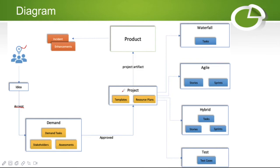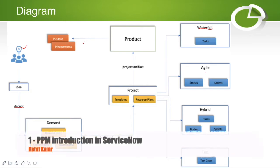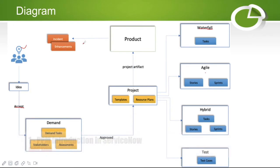Once the project is created, it can be divided into three parts: waterfall, agile, and hybrid. If you don't install the Agile plugin, you will only see waterfall tasks. Once you install the Agile Development plugin, you can create agile and hybrid projects — hybrid meaning waterfall plus agile. From the waterfall model you can create change requests; from agile tasks you can create stories and sprints.